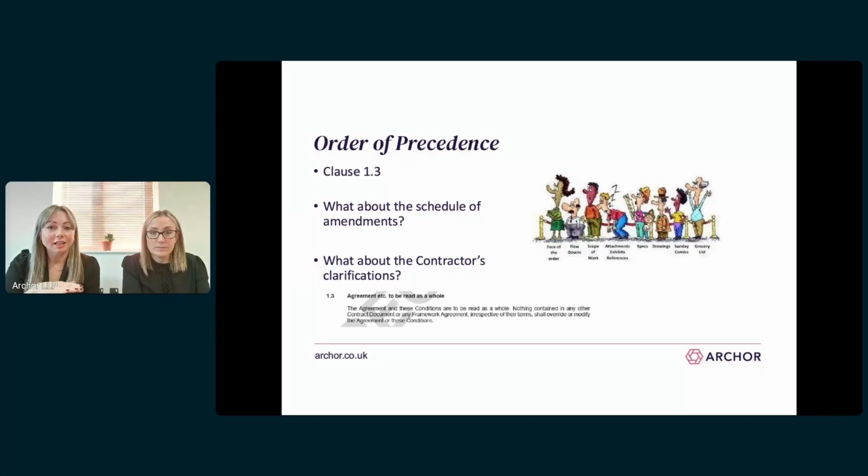And if there's anything in that list that needs to override what is in, for example, the employer's requirements, then this needs to be expressly dealt with and referred to, ideally in the schedule of amendments, if possible. Now, we see a lot of arguments where a contractor's price is based on assumptions, but those assumptions do not actually form part of the contracts. They put them in at tender stage and then it just doesn't come through to the contract.